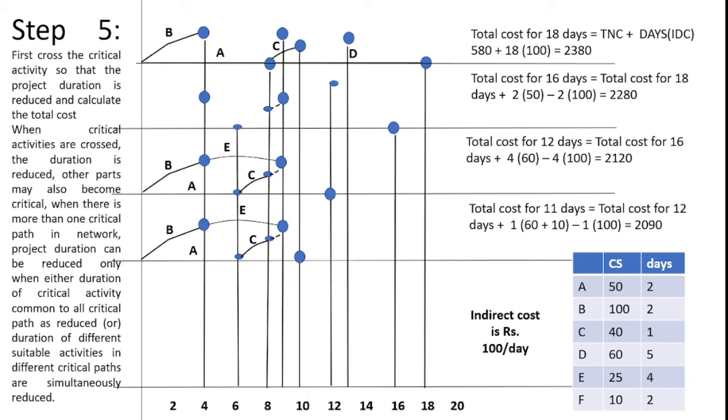After that, as per our critical path, after A there is D available, so I represent D after completing A. D consumes how many days in total? Yes, 2, 4, 6, 8, 10 days. So I represent 10 days for D on the graph sheet like this.